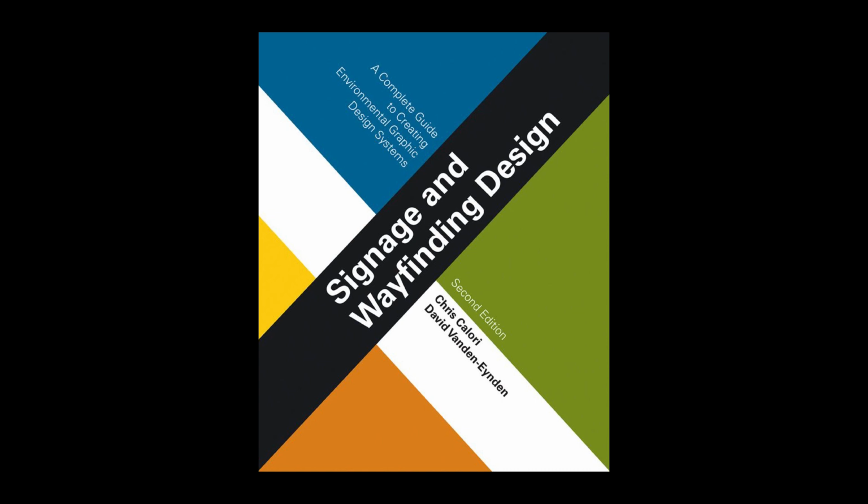Before the documentation phase begins, the EG designer and client should agree on the format for the signage design documents. If that discussion has not already taken place, this includes the final sheet size of all documents in the package, whether the signage package is a standalone or part of the document package for an overall construction project, which often happens when signage is part of new construction.